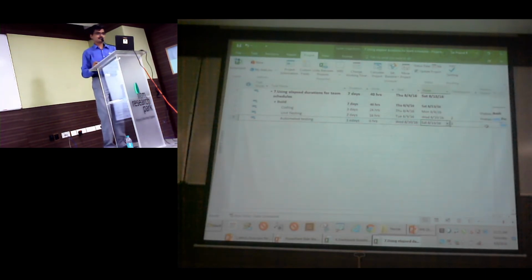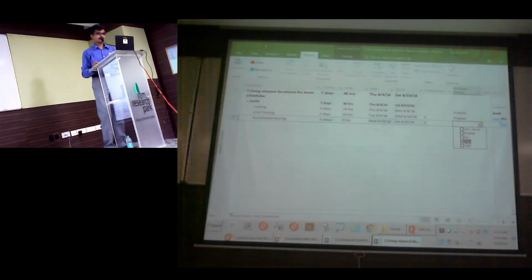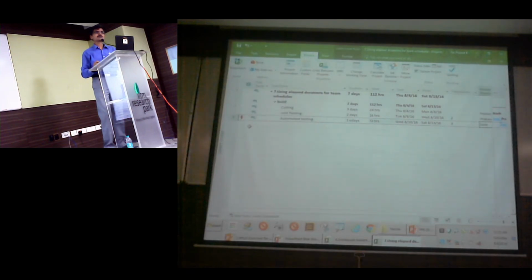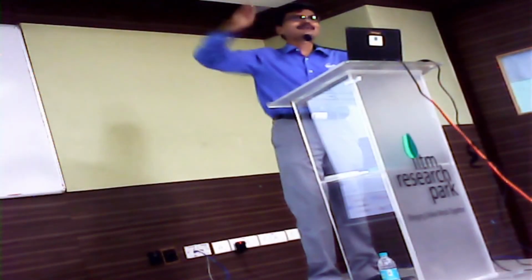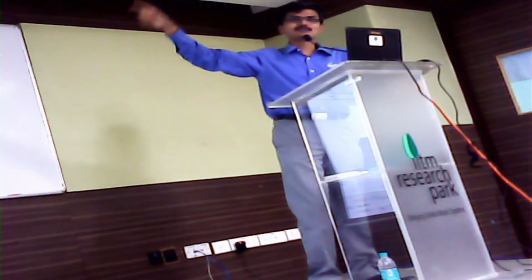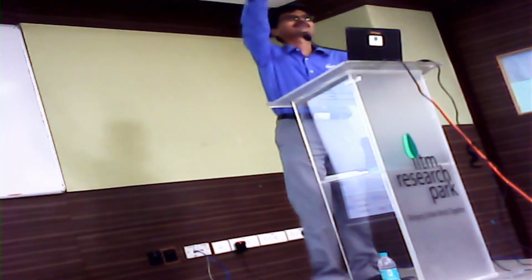I just did it so that you can see its impact. We use this for weekend changes. Exactly, you're right. It can be done for a weekend schedule. Here I'm not even using a task calendar. I'm simply saying the task needs to be scheduled as per calendar days and not business days. This is a very good option.